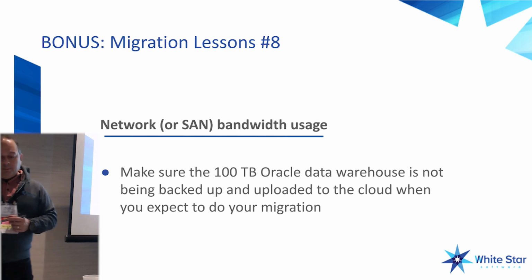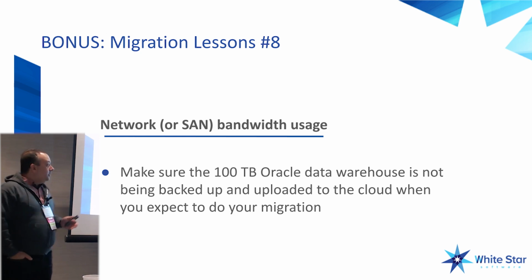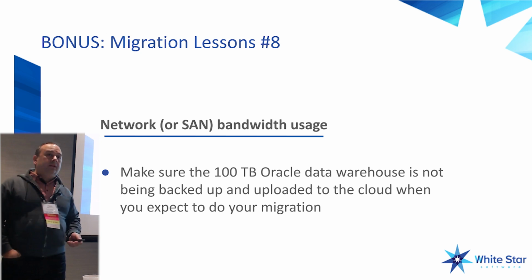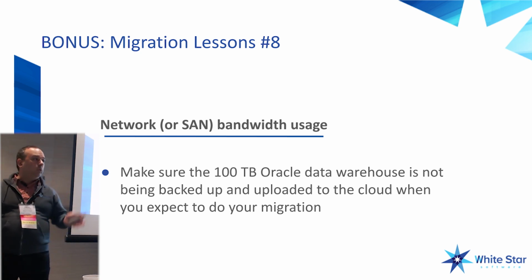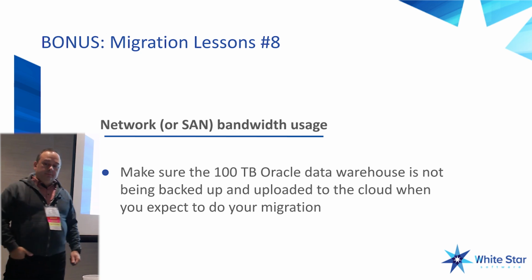Good. And then bandwidth users, again, I talked about this earlier. If you're doing a big dump and load, coordinate with the other teams in your business to make sure that they're not doing a 100 terabyte backup when you're supposed to be doing your dump and load. Because it's very hard to find out. They just scheduled it. Nobody's working, right? And then you look at the SAN, and the SAN is just not giving you the performance you expect. And again, the usual culprit is this: someone's running some big job or big backup or big something else, absolutely unrelated to you, but you're on shared infrastructure.